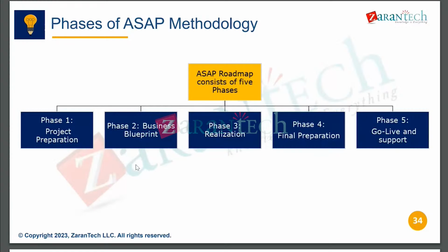In go live, we have two phases: technical go live and business go live. Technical go live is where we move all the changes and developments into the production system, and we will not release the system to the business. The functional consultants or respective SAP consultants will do the cutover activities. We need to maintain some custom tables and upload the master data. From the purchasing side, we have to upload the initial inventories, like stocks available in the plant; that inventory stock will be maintained here.